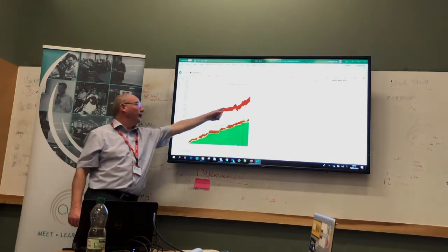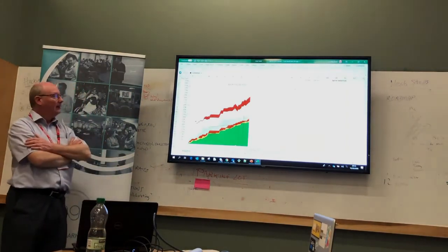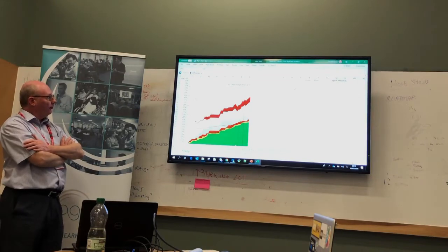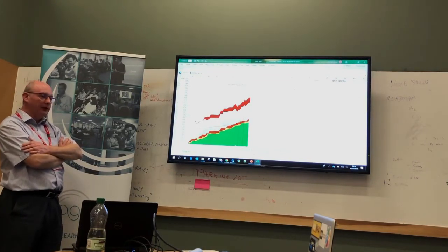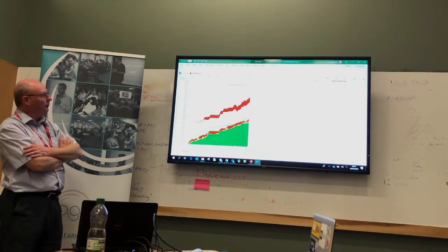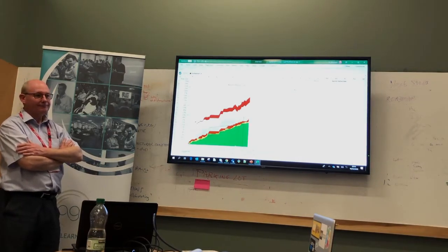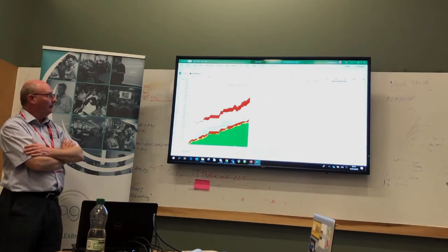And then this crimson stuff on the top, that's the bug load. Again, 5 points per bug. So those are the bugs that the product owner has agreed that we can leave until after release 1. Otherwise, that bug load wouldn't just be growing, it would be dealt with. So that's essentially tech debt.